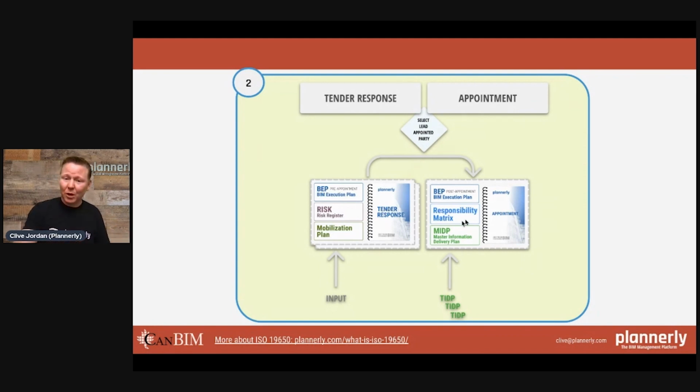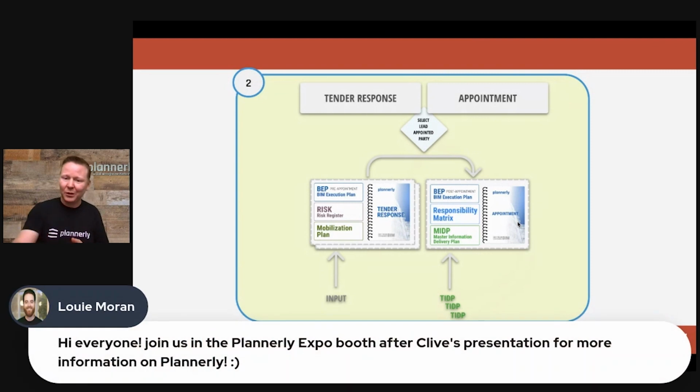This appointment workflow then steps into a more collaborative approach where you are starting to form what's called the task and master information and responsibility planning steps. These are essentially the tasks, but in a much more structured fashion. And this appointment workflow will unpack and try to understand how, whilst keeping it a database, you could keep a set of documents, but keeping it in a database means that you're able to filter it and control it a lot more easily.